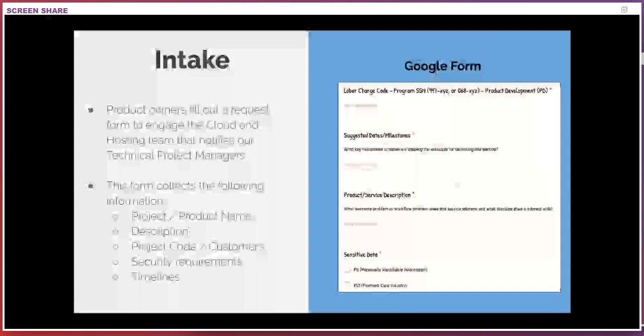During this internal review meeting, we also create a solutions diagram. We'll put in there things like we recommend serverless, and we recommend that your lower environments run on Spot. We document assumptions and risks. This is really useful to help protect the engineers that are going to work on this. And then our FinOps team uses this diagram to calculate what the infrastructure and labor cost is going to be.